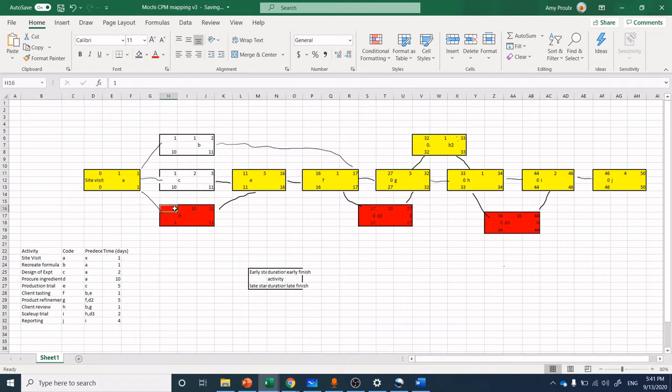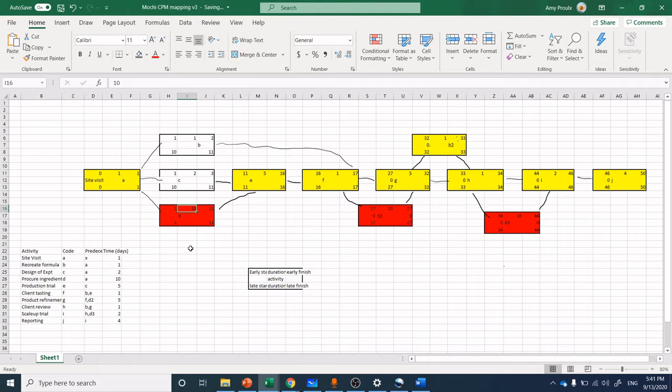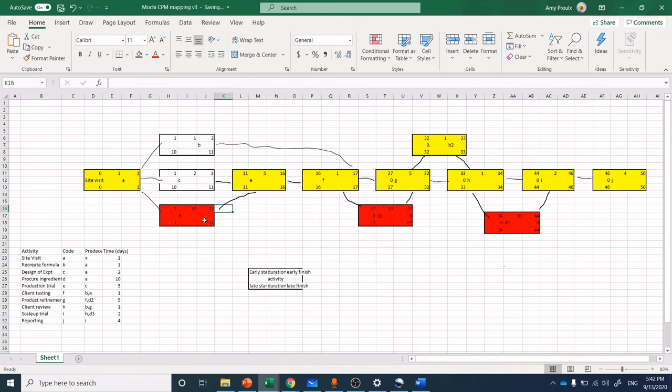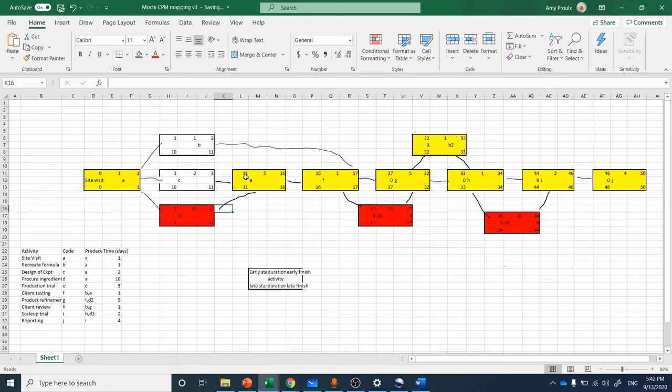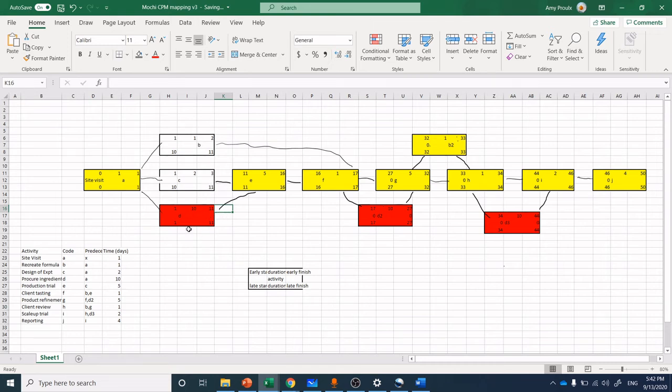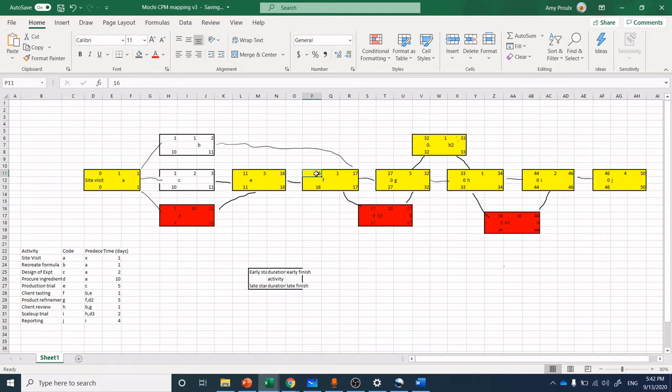Here we have activity of procuring ingredients. So we start on day one, and it's going to take 10 days. Quite often you call up those suppliers and they say, okay, two business weeks and we'll get it to you, no problem. So that's 10 days. So start on day one, 10 days later, we're at day 11. Now here's where it's interesting because these are parallel activities that they can take place sort of simultaneously, but moving forward, we can't jump into activity E, into the initial production trial until all of these activities are complete. So which is our start day? Well, it happens to be the last day. We can't start until everything's received here, so we're at day 11 in terms of the dependency.